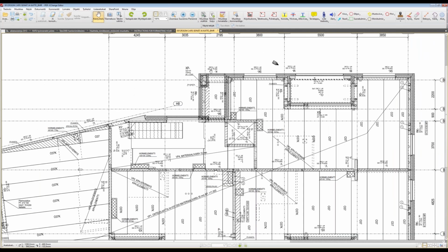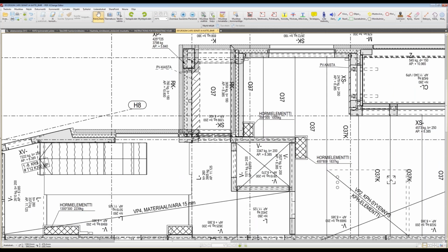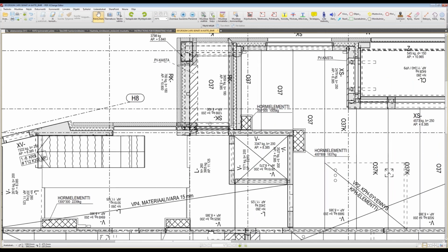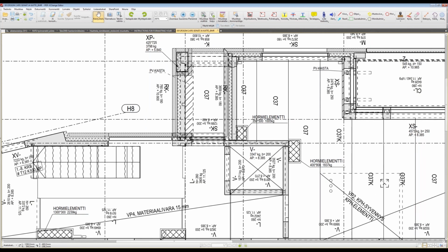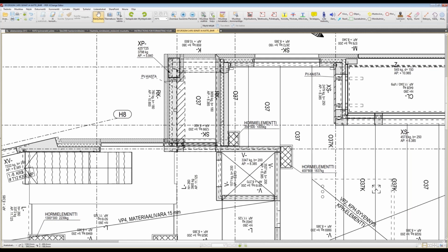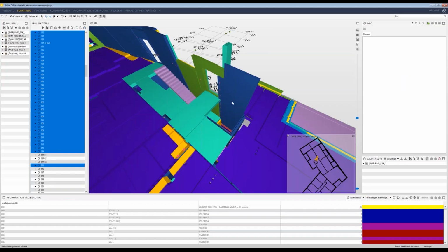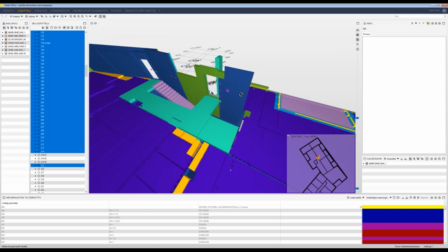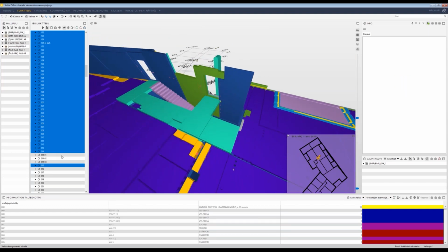This place right over here, the contractor's initial plan was made using these design documents, and just taking a look at this, it is a little bit difficult to realize in great detail the ordered installation, but working in the 3D environment, it is a little easier to spot errors like this.